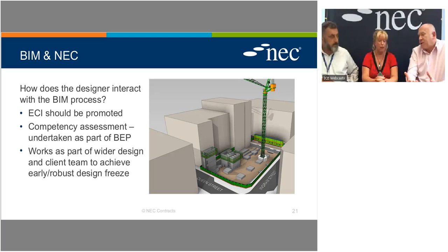I mean, it's pretty obvious, I'm well aware of the sort of clash detection and avoidance, and what I say in lots of jobs is sorting a mess out, because you have clashes all over the place. And I'm aware that BIM is far, far more than that. But surely that in itself would just pay for the clash detection, which is really the buildability, very first phase, brass tacks. To me, the biggest value in some of this is actually stopping the client changing the design, because you can achieve design freeze a lot quicker. So the majority of design changes come with the client coming along saying, I don't like that door over there, I don't like that window over there. Whereas if you've got that agreed up front, there's very little interruption on your building programme.